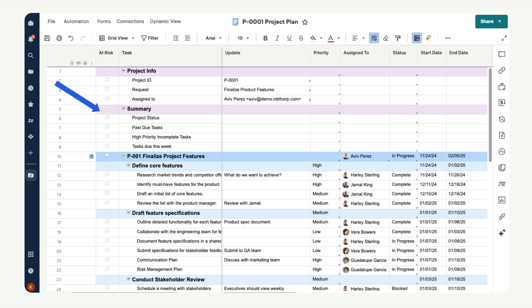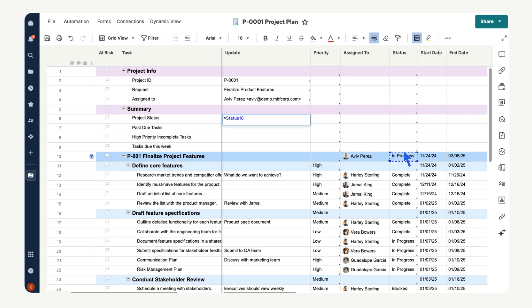In the cell next to project status, enter an equal sign. The equal sign is how smart sheet knows you are entering in a formula. We want to pull the project status from row 10. Select the cell on row 10 with the project status. Now this cell is referenced in the formula. Select enter to see the status now appear in the summary as well.